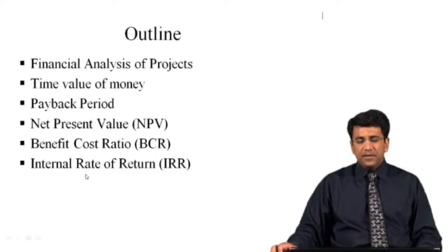Then another important concept in financial analysis of the projects is the internal rate of return. Again students, we will discuss how we can calculate the internal rate of return, and that is actually the discount rate or the rate of return at which the net present value becomes 0, or we can say when the BCR becomes equal to 1.